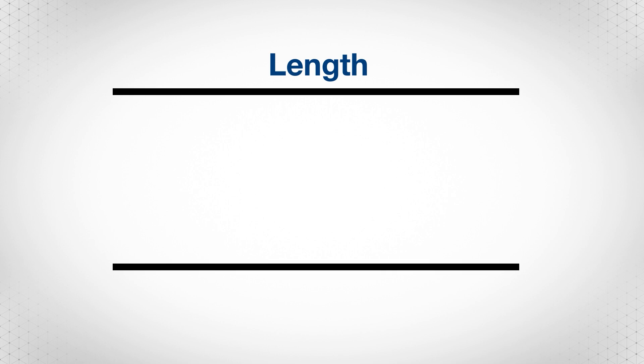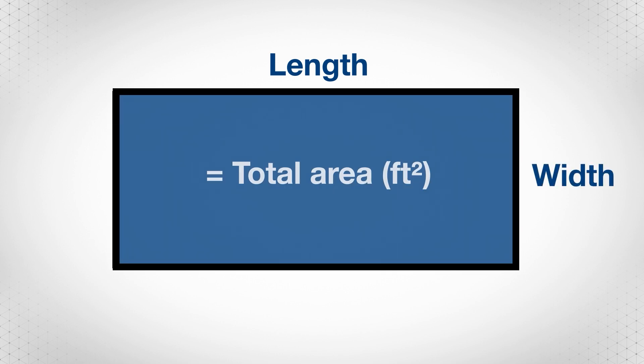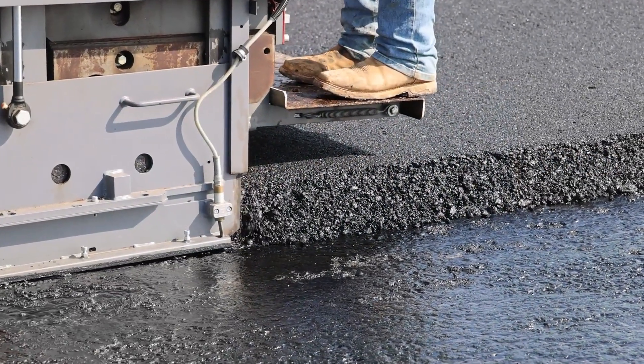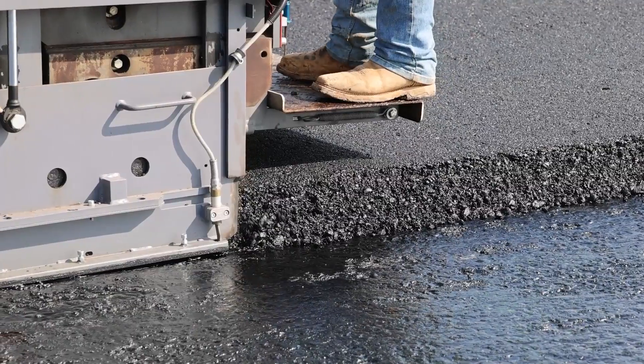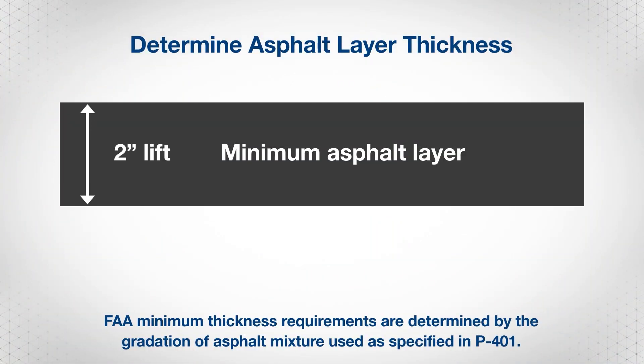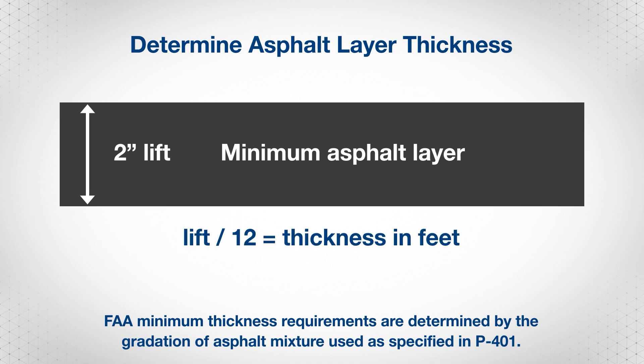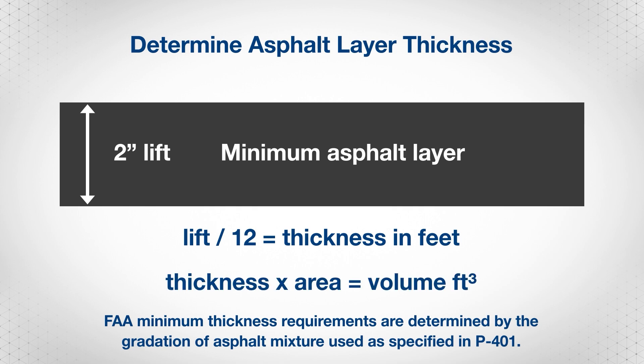Multiply the length by the width to get the total area in square feet. Determine the thickness of the asphalt layer — a two-inch lift is common for airfields depending on traffic and load requirements. Convert this thickness to feet by dividing by 12, then multiply the area by the thickness to get volume in cubic feet.